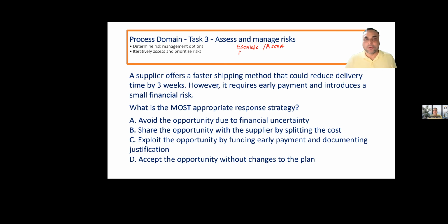For negative risks, we have avoid, mitigate, or transfer. For positive risks, we have exploit, enhance, and share. So when you read this, which risk response do you feel it is?